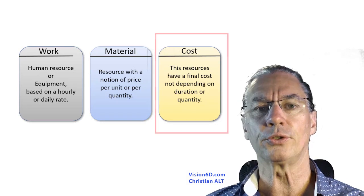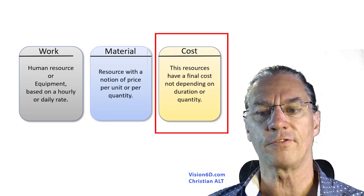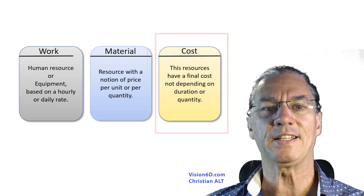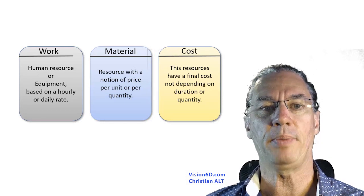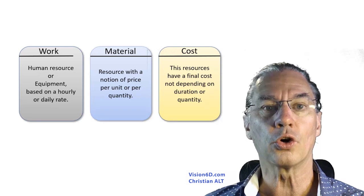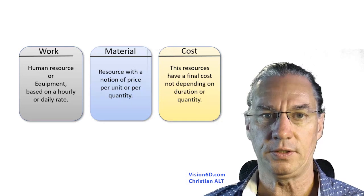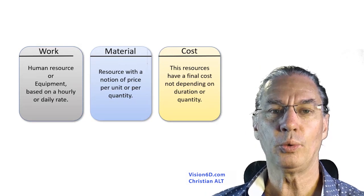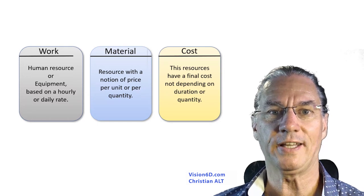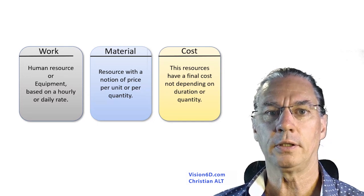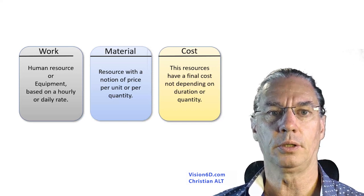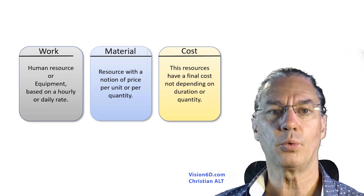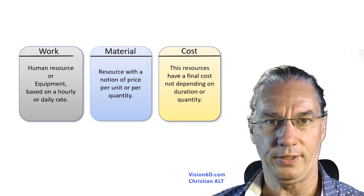The third resource is a resource of cost. It means that it has a final cost. It's not depending on the duration nor is it depending on the quantity. In our case we will request from an architect office to handle all the process of getting the build permit. For this we are going to pay a flat rate.